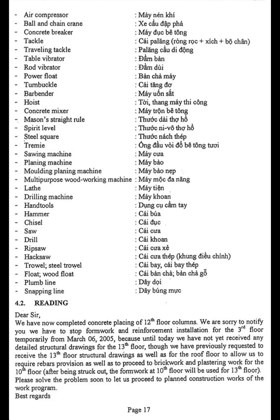Section 4.2 Reading. Dear Sir, We have now completed concrete placing of 12th floor columns. We are sorry to notify you we have to stop formwork and reinforcement installation for the third floor temporarily from March 6, 2005, because until today we have not yet received any detailed structural drawings for the 13th floor, though we have previously requested them. We require the 13th floor structural drawings to allow us to proceed with rebar provision as well as brickwork and plastering work for the 10th floor.